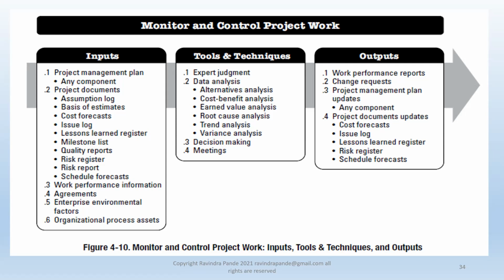So when you install a biometric on the wall, how much time will it take? First, before fixing it on the wall, I'll make sure that the biometric machine is working. Then I might pull out a certain hole-making machine, certain plugs to go into that hole so that the screws, whatever I tighten, are fixed. Then I take the biometric machine and the required nuts and bolts to fix it to the wall. The whole process might take anything between an hour to a couple of hours, again depending on the resources.